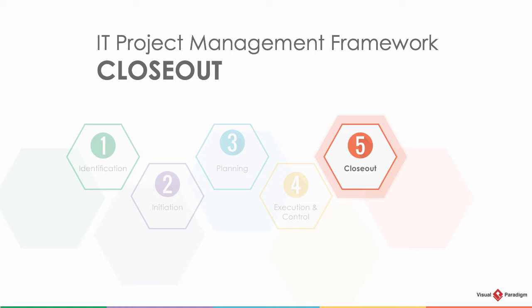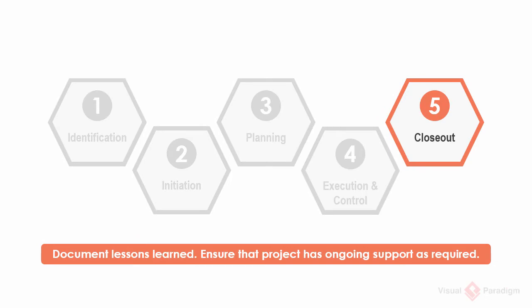Welcome to the final phase of the IT project management lifecycle: the closeout phase. The previous phase, the execution and control phase, ends with the acceptance of project deliverables. In this phase, the project team will document the lessons learned from the project and transfer the deliverables to operation staff who will use and maintain the deliverables as an ongoing activity.